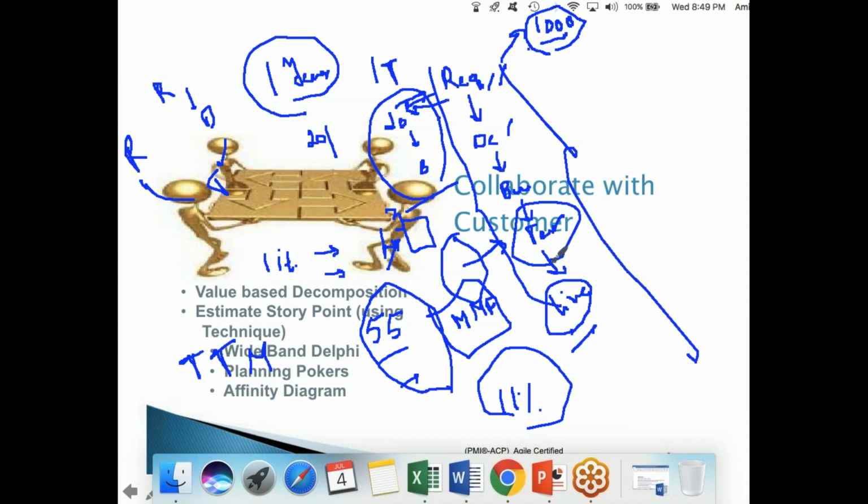If something goes wrong, then the rework will be very costly for you. Though you are doing testing only once, that failure is very costly because you are doing it at the back end of the project. Whereas here, for every feature or for some set of features in that iteration, we are testing it. So we are testing it more frequently. So the quality of the products in Agile will be better because you do the testing every iteration.